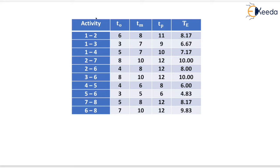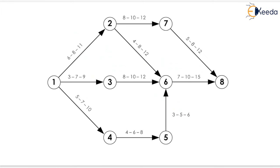Now the activity T0, TM, and TP are already given in the question. We have computed the activity time, that is TEIJ. For activity 1-2 it will be equals to 8.17, similarly for 1-3 it will be equal to 6.67, and similarly for 6-8 it will be 9.83. Now we will mark all the activity time on the diagram — we have marked all the activity durations in red pen.